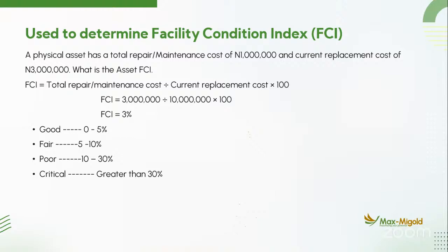After you have collated all these small costs and every other thing, and you sum up the cost, you now discover that the cost is almost equivalent to the cost of replacing that particular asset. Then the best you can do is to get that asset replaced.